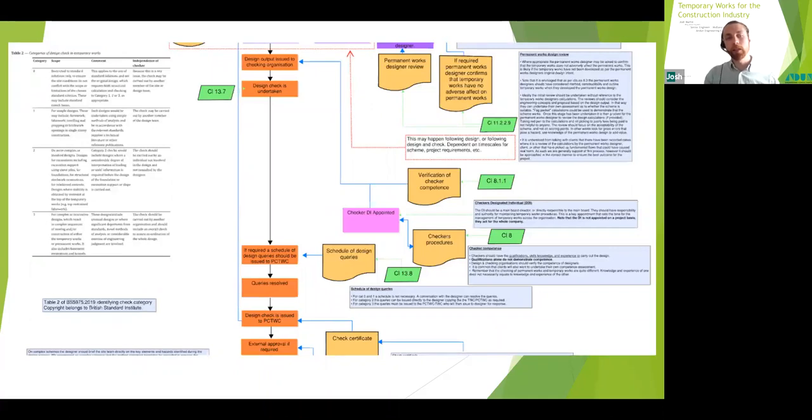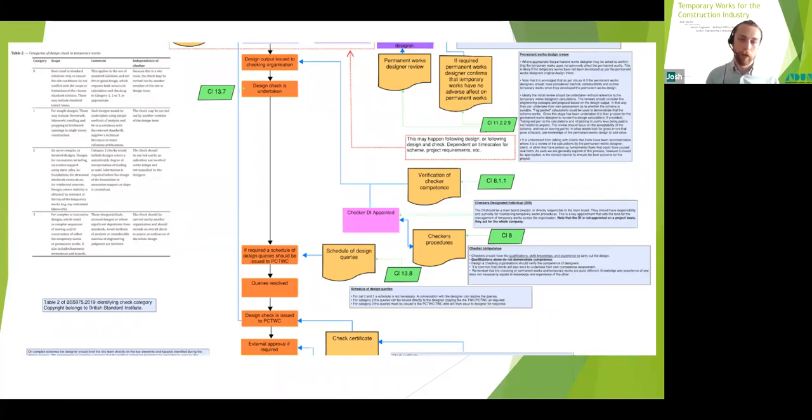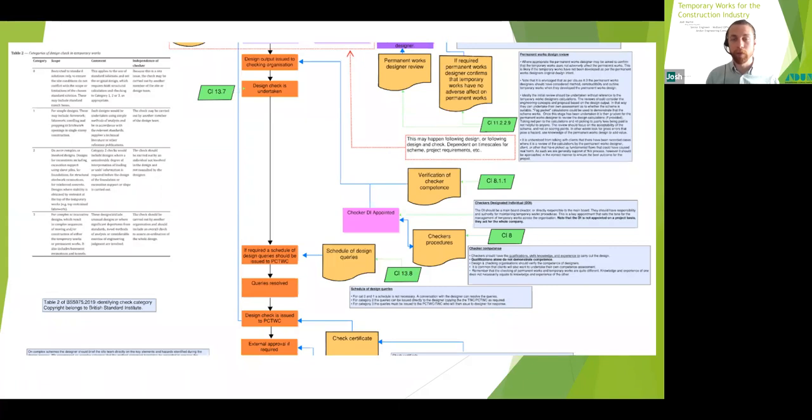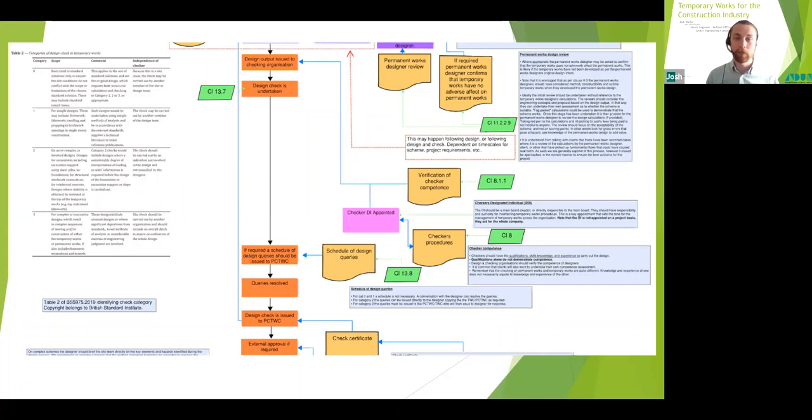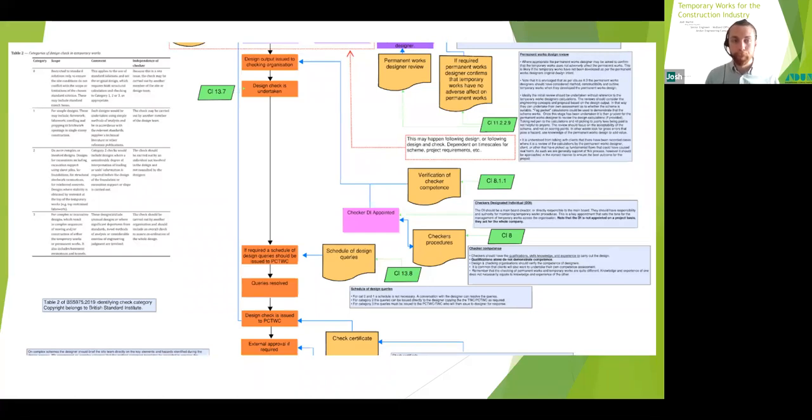So once that stage is done, now the level of check can be confirmed and the design principle approved, the design can then be sent to the checker. For some designs, the check level may be Cat 0 or Cat 1, in which case it will have probably already been checked as the package sent straight to the TWC. This is because it's common practice for all designs to receive a Cat 1 review before anything is issued outside the company, much like we do at Andan. But if it's going to be Cat 2 or 3 check, then it's prudent to have a review with the site team as well for them to comment. It's not uncommon for tweaks to be made at this stage. For example, the preferred supplier of a propping system may need to be changed if the contractor is finding a particular system difficult to procure.